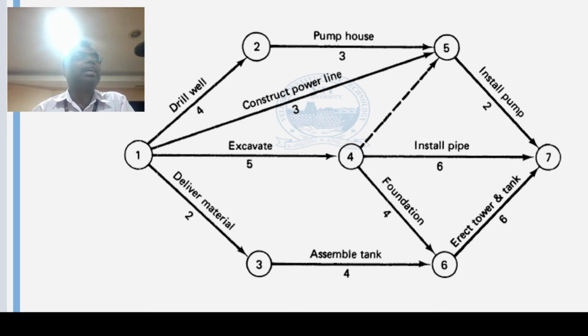But when you come to L5, it may be even in the order of a few hours. Okay, so this curing has to start after so many hours. This will be done by such and such person. You can drill down to such details also. So this unit of time is something which is a little variable.